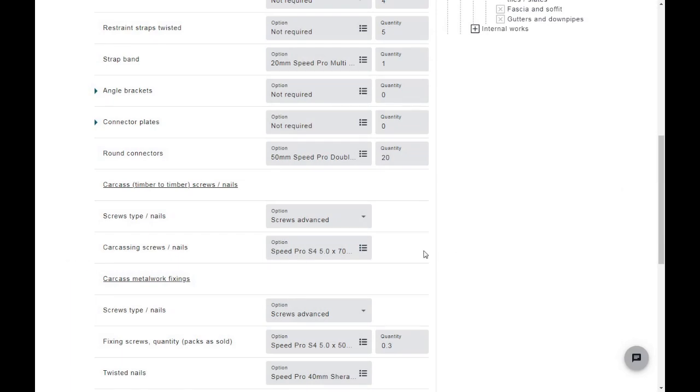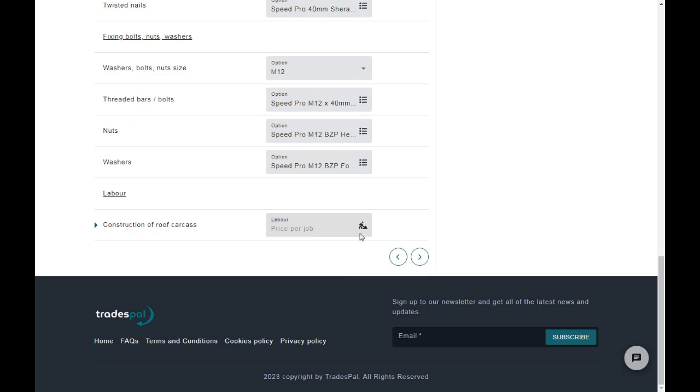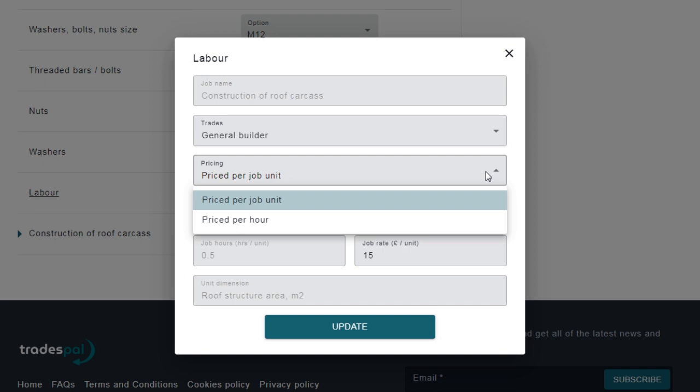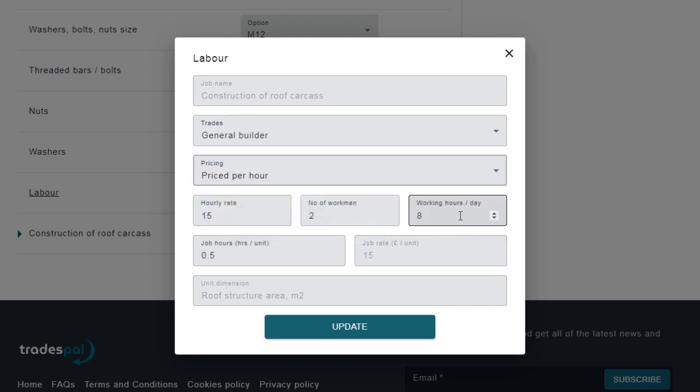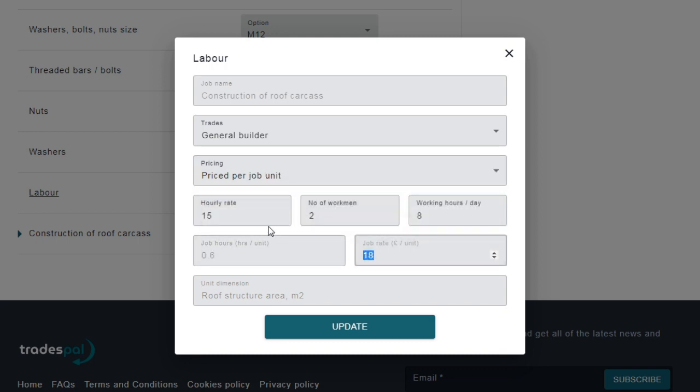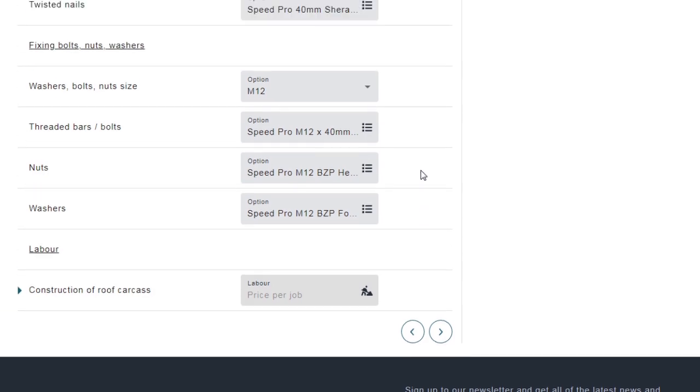The project task items are used for calculating the labor costs and durations of each task as well as duration of the whole project. Each task item can be used either as priced per unit or priced per hour. Switching between these modes allows you to change the duration and cost of the task per unit. Cost of the task unit will affect the project costs, while duration of the task unit will affect the Gantt schedule, commonly known as building program, block length, duration of the schedule task. We recommend setting all of these tasks within modules and templates appropriately as soon as you start using the app.